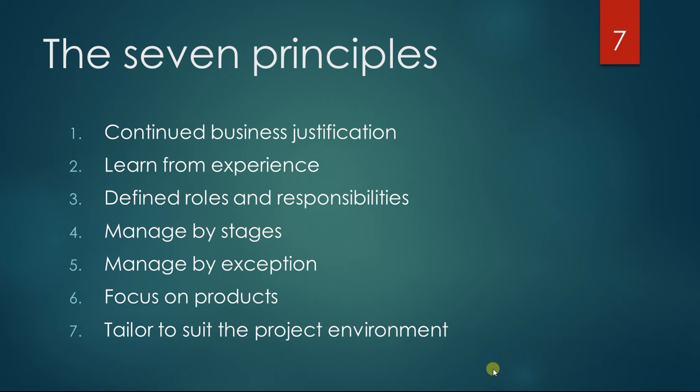And number 2 is learn from experience, and I think this is a really good one. The first education I got on project management, at the end of the project you would do an evaluation, and that would be it. If you look in the Prince2 manual, every time you start to produce a plan, you have to seek lessons learned.